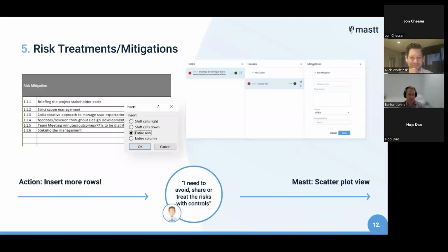So when you review these risks later on, if it's still showing as open, it's open, and it means that action hasn't been actioned. It does quite often happen when you're running through an Excel spreadsheet that it takes so much time to run through it, that you get to the end where actions are being applied, and you say, oh, we'll post the workshop, we'll allocate actions, review the minutes, and look for your own actions, and then carry out your own actions, which does not tend to happen.